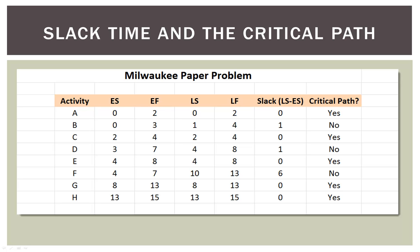This is the spreadsheet for our network. Some of our activities have slack and some don't. Notice that if the slack is zero, the activity is on the critical path, and when we do the diagram that will make more sense.